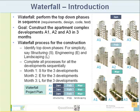If you look at the depiction on the right side of your screen, slide 13: in January, A1, A2, and A3 all have their bare-bone structures laid out. Month two, there's more completion — windows, doors, plumbing, wiring all taken care of. Month three, I add the next layer which is landscaping. The same is depicted in the waterfall project plan: in January, structuring has filled A1, A2, and A3; in February, engineering has filled A1, A2, and A3; and landscaping has filled A1, A2, and A3. End of three months, you are done.